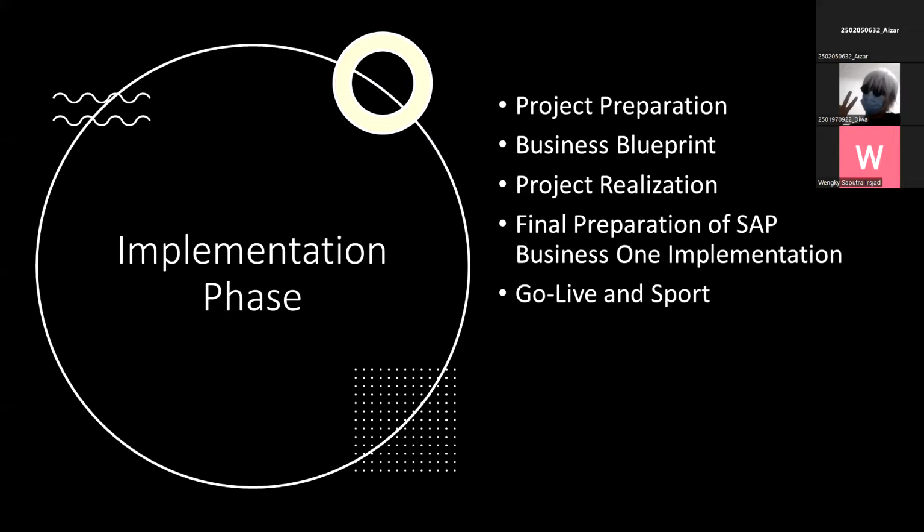And then the purpose of this phase also is to prepare SAP Business One system and the client organization to go live in production. The key activities of this phase include the completion of the user and administrator training and final fine-tuning of the SAP Business One system. Necessary adjustment and cutover activities are completed to resolve all critical issues and make the system ready to go live.